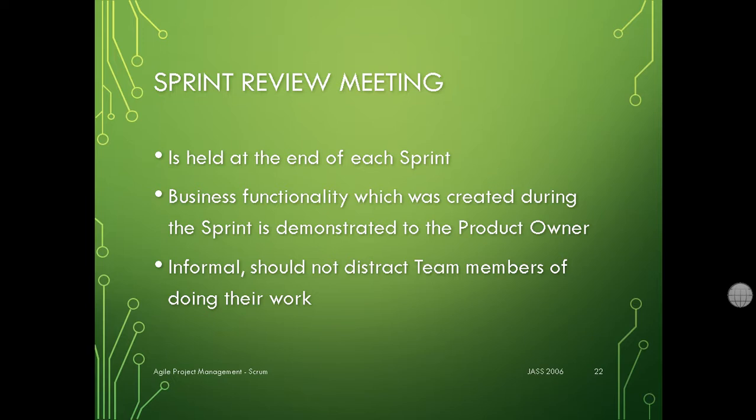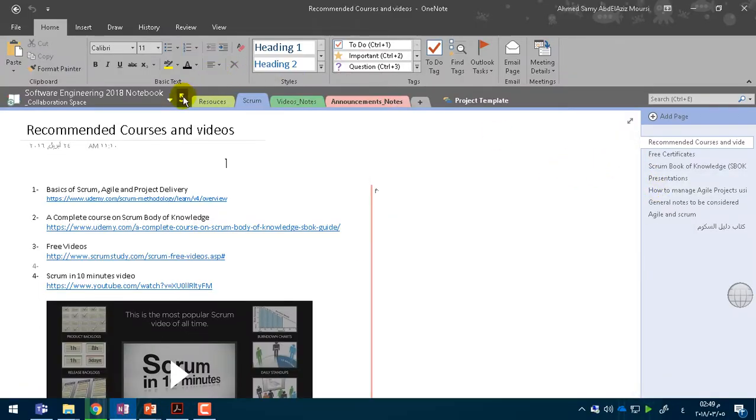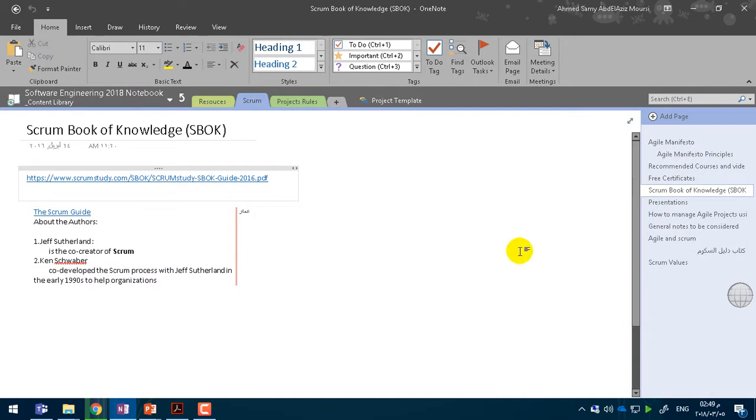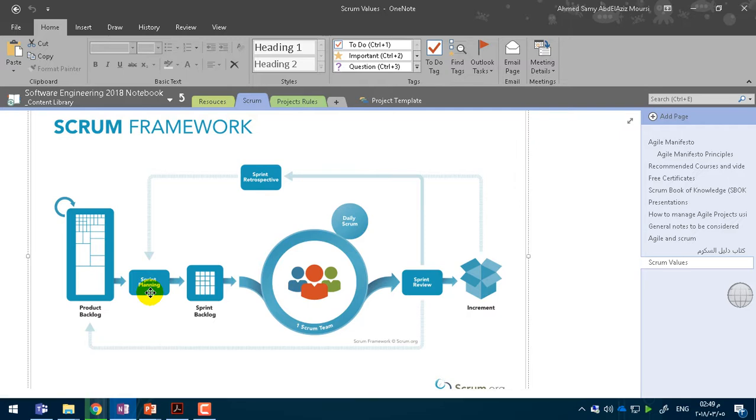So a sprint, then a new sprint. And I think that image would clarify my point here. As you can see, review, retrospective, then planning. Okay? And please try not to merge these 3 meetings into one. Keep them separate, to fulfill the goal of each meeting.